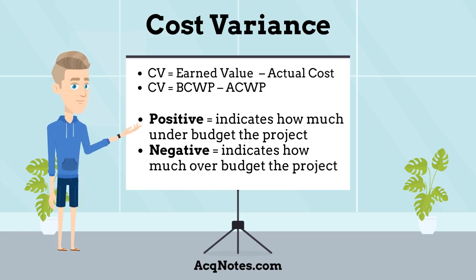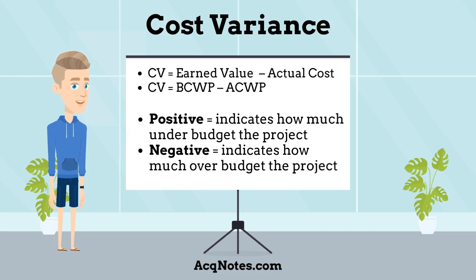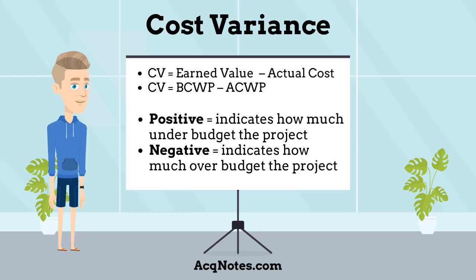Cost Variance is the first type. It is calculated using the following formulas: Cost Variance equals Earned Value minus Actual Cost. It is also calculated as Cost Variance equals Budgeted Cost of Work Performed minus Actual Cost of Work Performed. A positive result indicates how much under budget the project is, and a negative result indicates how much over budget the project is.